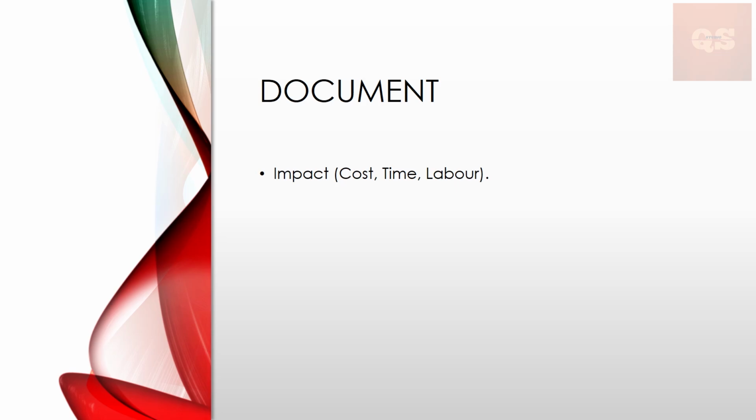All these need to be properly documented, which is a very important step, because the important thing is the money. If you see in a construction project, a lot of cost overruns happen due to these variations. As a consultant, when you get such documentation worked out from the subcontractor, you have to carefully review and analyze it. And as a subcontractor or contractor who is carrying out this work, you need to have proper documentation, proper costing, or else it could be a loss for you. So that is the next step, which is documentation.